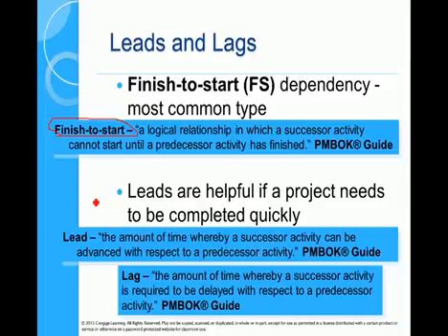But we can use leads and lags. Leads are a bit more tricky, but lags are possible. Lags means putting buffers in the schedule, to deal with things like risk. So if we're bringing on a tugboat in an offshore project, which might be $150,000 a day, and we have to make sure all these other things are in place before that can be done, then we might want to put a buffer in the schedule to avoid any problems. Okay. If we delay it on those predecessor activities, it's going to cost us $150,000 a day in downtime.